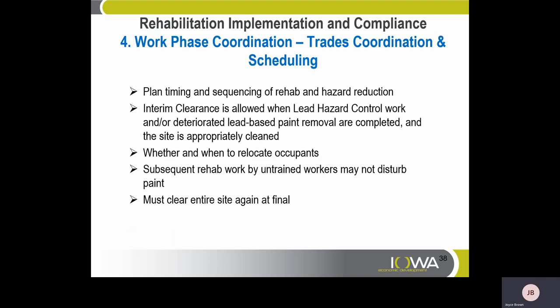Work phase coordination, trades coordination, and scheduling. Plan timing and sequencing of rehab and hazard reduction. Interim clearance is allowed when lead-hazard control work and/or deteriorated lead-based paint removal are completed and the site is appropriately cleaned. Whether and when to relocate occupants — subsequent rehab work by untrained workers may not disturb paint. Must clear the entire site again at final.